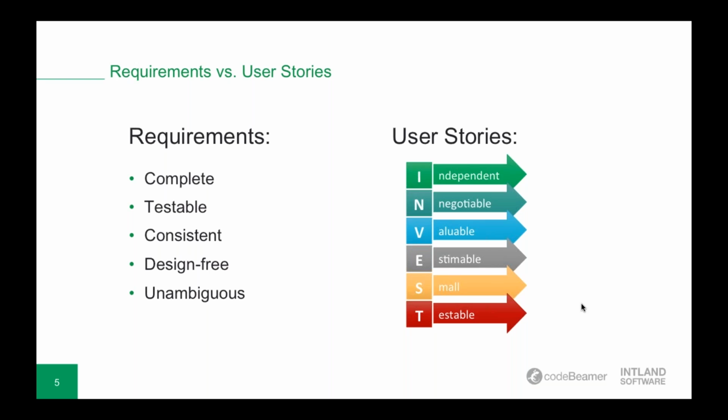Also, user stories are typically told from the user's perspective, and they're short and to the point and written in plain language, but they should also be unambiguous if possible. And they should describe the capability that the user wants, speak to the reason for the change and anticipated benefits, and be delivered in whatever way the user wants. So it can be handwritten, in email, or on sticky notes, so there are no real rules or guidelines for that. And a good written user story is usually accompanied by acceptance criteria.